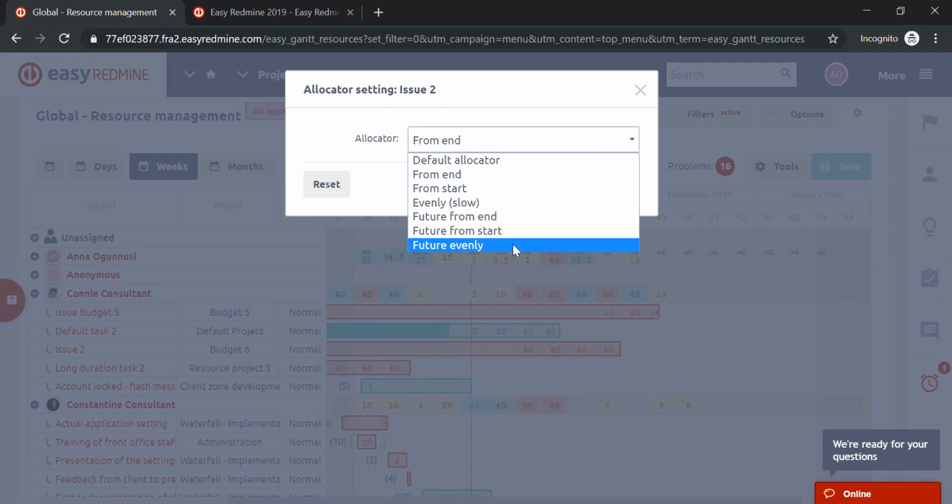So the hours are allocated evenly throughout the duration of a task, starting from today onwards. Only the last day of the task duration is never auto-balanced, because there will be all the hours remaining. And that's something that you can usually see when you are using the allocator: if a person can work 8 hours a day, it'll give them 8, but then there is still a lump sum of estimated time remaining, so it'll all be moved onto the last day.